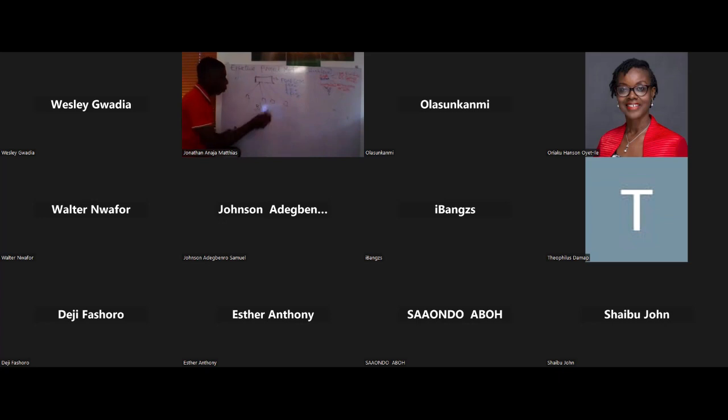But for bottom up, what I'm going to do is I will take the foundation and I will list all the tasks. How? Excavate, block work. After block work, let's say weak concrete. After weak concrete, let's say filling. After filling, let's say hardcore. After hardcore, let's say concrete work, right? I must have missed some, but don't worry. My foundation footing is not there. Concrete footing. So after excavation, there is footing, right?